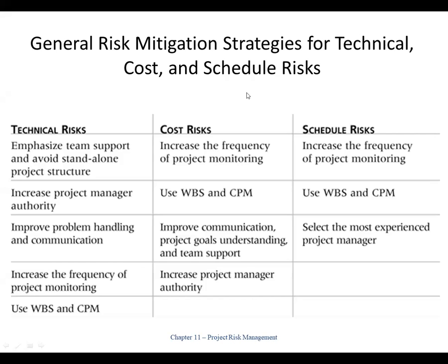technical risk, cost risk, and schedule risk. And in speaking about technical risk, you can emphasize team support and avoid standalone project structures, increase project managers' authority, and also improve problem handling and communication among your group members, and increase the frequency of project monitoring. Increasing the monitoring would always help you mitigate any risks.